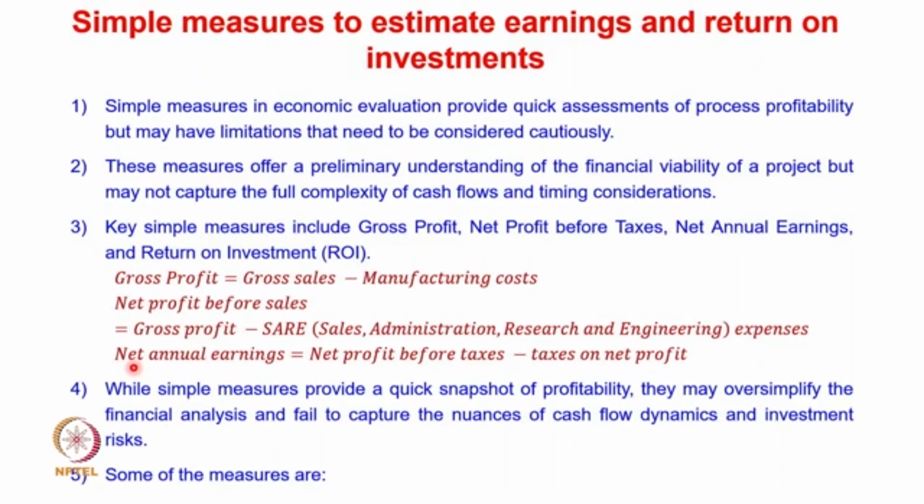And then the next is net annual earnings. Net annual earnings is nothing but net profit before taxes minus taxes on the net profit. So whatever net profit we have obtained here, we can subtract the taxes from the same, and we get the net annual earnings. So these simple calculations can give us whether the project is viable or not.